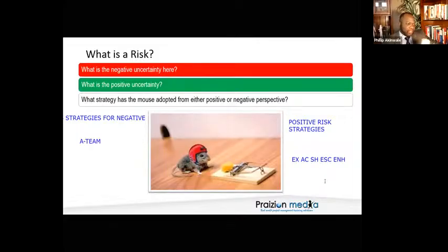So let me ask you a few random questions, and you can just type in the strategy. Phil encounters a risk on his project and he feels he's not qualified to handle it. He tells his boss about it. What strategy is that? I'm not qualified to handle this, so he tells his boss. Thank you, Yolanda. That is a good answer. I know what you meant. Escalate. That is the correct answer.